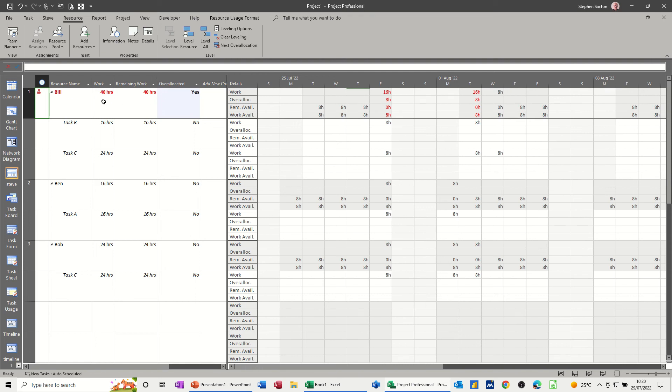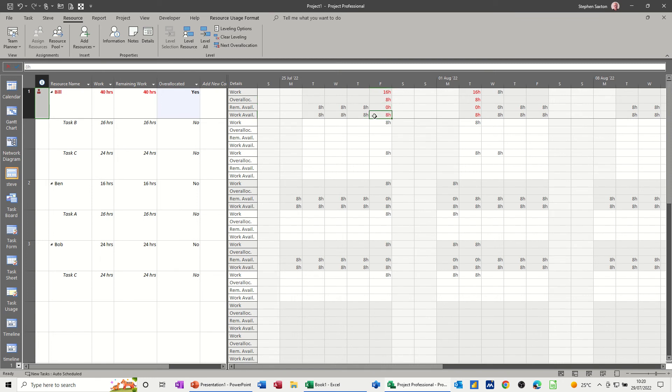So in my view, and I tell my classes, if anything's red, you've got to sort it out. So what we've got here, we've got him doing 16 hours in one day. So, over-allocated by eight hours there. It's got no remaining availability, and initially it was available for eight.